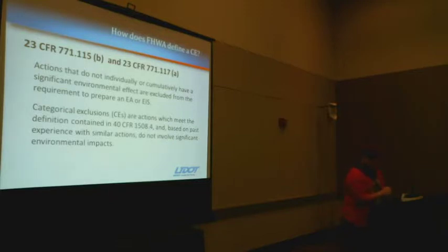Something else to consider, though, is that just because it's excluded from the need to prepare a separate document doesn't mean that it's not subject to any other environmental laws. So, for example, you still might have a consideration under Section 106 for cultural resources or Section 404 for wetlands that may not initially be considered if you're not doing a full document.